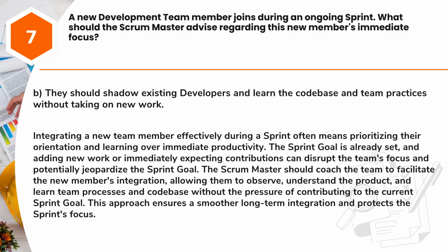Answer, B. They should shadow existing developers and learn the codebase and team practices without taking on new work. Integrating a new team member effectively during a sprint often means prioritizing their orientation and learning over immediate productivity. The sprint goal is already set, and adding new work or immediately expecting contributions can disrupt the team's focus and potentially jeopardize the sprint goal. The Scrum Master should coach the team to facilitate the new member's integration, allowing them to observe, understand the product, and learn team processes and codebase without the pressure of contributing to the current sprint goal. This approach ensures a smoother long-term integration and protects the sprint's focus.